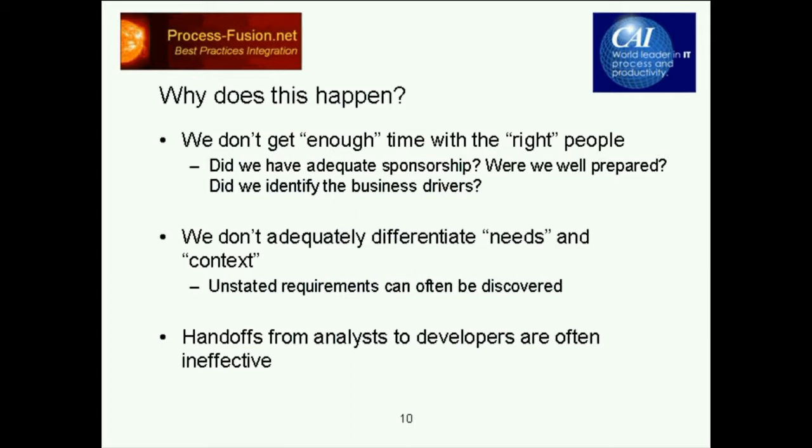And usually the root of that is that we didn't really have adequate sponsorship. If the person who wants this project and who's going to pay for it, whoever that may be, the finance department or the marketing department or the manufacturing department or whoever it is, if we don't have adequate executive sponsorship, if we don't have a person who's really willing to step up and make the necessary people available, we're going to have big trouble. So one of the keys to success is to be more